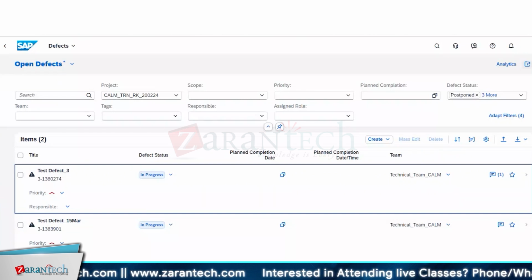But probably it is down the line that from defects you can either create it as a feature, or at least link it back directly to that particular feature, with that tagging, because that is important. In a normal scenario, once a defect is raised, it is going to be worked by someone, so you'll assign it to person ABC. And then you will give a transport. Usually in projects, creation of a transport or change document is with the work stream lead, so the developer will ask, please give me a transport or change document to work on it, right?